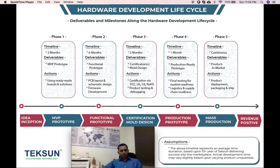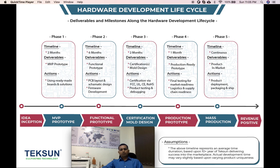Phase 1 helps a lot in terms of avoiding failure of the whole product development plan. When you start the actual product development in Phase 2 — which involves custom PCB and hardware with a longer timeline — if you then discover the product needs huge changes, all that development time and cost would be wasted. Phase 1 ensures we're building in the right direction. The MVP may include MVP hardware, MVP software, and MVP mobile app — all at an initial prototype level.